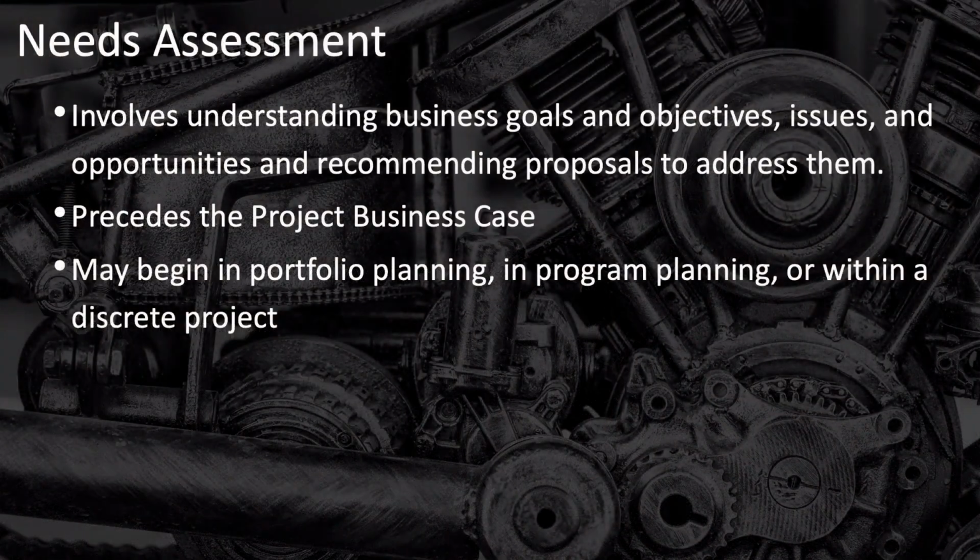All projects start with a need to be met. A proper needs assessment involves identifying this need and documenting it in a needs assessment. It includes understanding the business goals and objectives, the issues involved, identifies opportunities, and provides recommendations of proposals to address these needs. The needs assessment comes before the project business case, and it may begin as early as portfolio planning or program planning, or it is sometimes included as a discrete project.